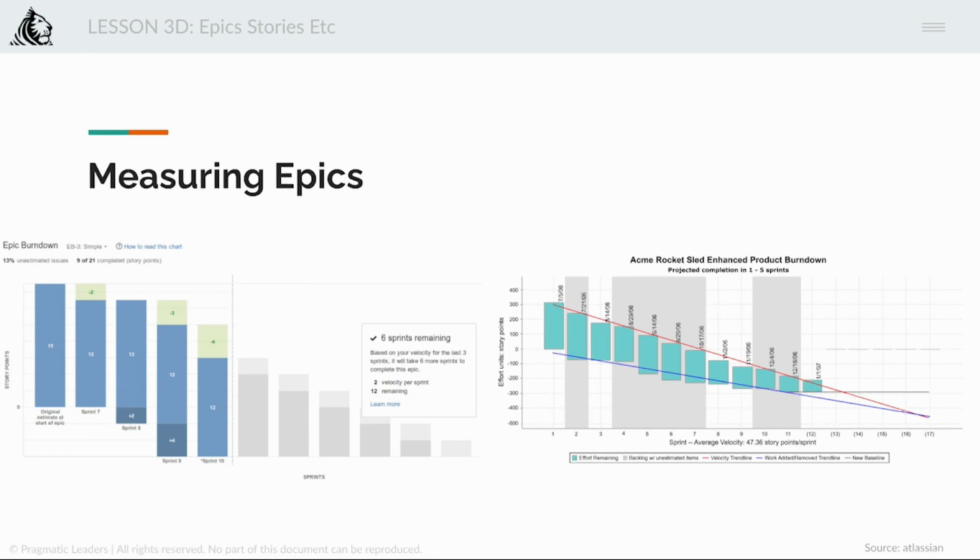Correct? Now let's assume that the sprint in their case is about 1 week or 2 weeks long. Let's say 2 weeks long. Right? So which basically means that to finish, let's say there's one developer, to simplify the entire scenario. Let's say there's only one developer. So he was going to take about 2.5 months, which is about 10 weeks. Correct? So 10 weeks and the sprint takes about 2 weeks. So 5 sprints. So the entire epic is going to be done in 5 sprints. Okay. So after each sprint, a certain amount of work is done.